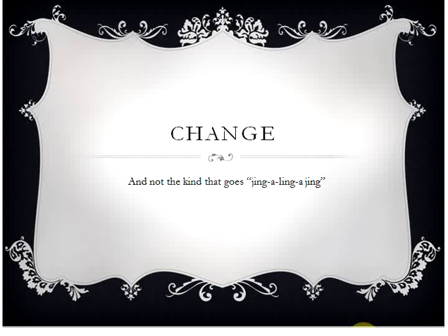a good change process that maybe defines when changes should take place. There's always going to be exceptions to this, and there's always going to be different kinds of changes that may or may not truly have an impact or take a lot of process to make the change. But on the far end, it's saying things as simple as never making a change on a Thursday or Friday. All changes, unless a patient is at risk, patient safety risk, all changes will only be made on Tuesdays.